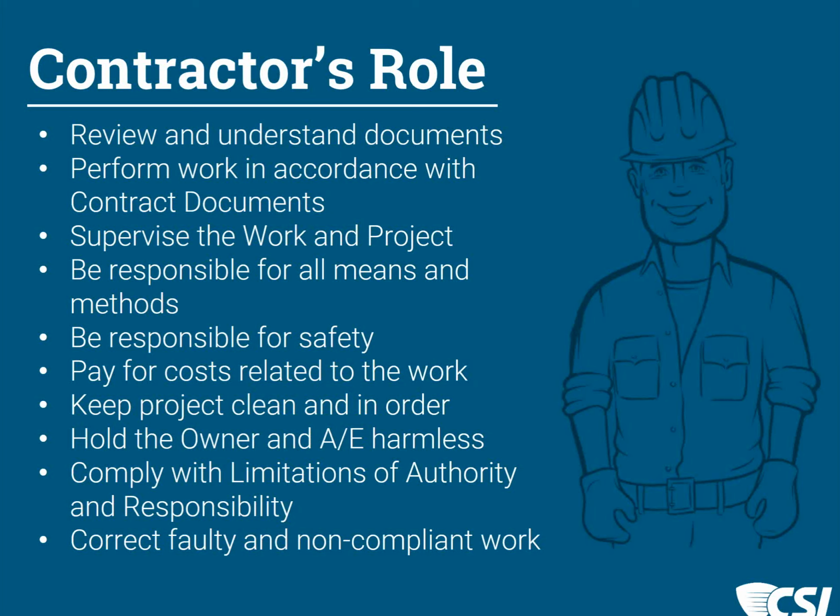They're to act expeditiously throughout the project, and are to maintain payment to their subcontractors, to maintain liability insurance on the project, to maintain performance and payment bonds if they are a portion of the contract.